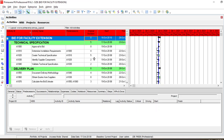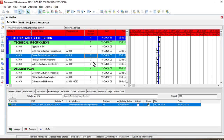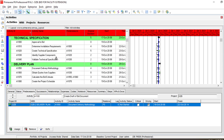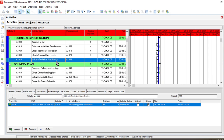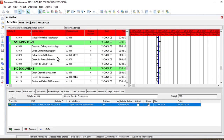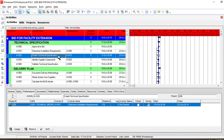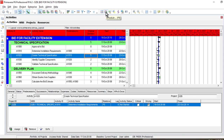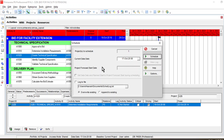Is this the final duration for the whole project? No, because we haven't scheduled it yet. Contrary to manual CPM, where you assign relationships and do all calculations manually — which is very time consuming for multiple activities — in Primavera we do it in a single click. Just go to the Schedule tab or press F9 from the keyboard to schedule the project.